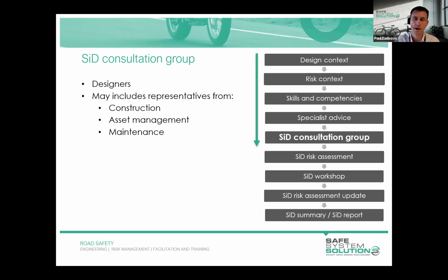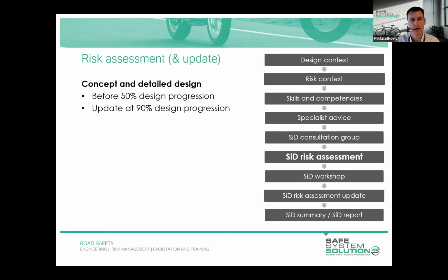At this point, we will look at the differences between what you'll need to do if you're undertaking a concept or detailed design and what you'll need to do if you're in the planning stage of a project. A risk assessment is required for concept and detailed design projects. It should be undertaken before 50% design progression and then updated again at around 90% design progression.